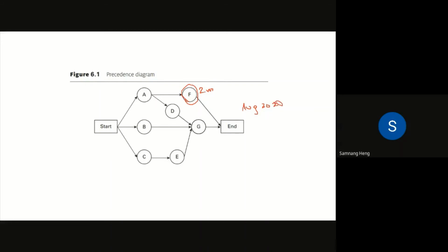So this one will take 2 months. You know that it takes 2 months, and this is like July. So the latest date that the company should start the project is June 1st. June 1st, August, June, not July. It has to start on June 1st. This is the latest date that they could start. They could start anything before June 1st, or maybe May or whatever. But June 1st is the final day that they should start that project.